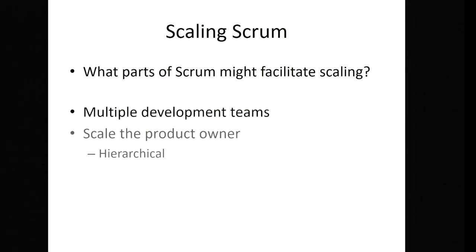We can also scale a product owner, and I'm going to go through some of these scenarios, and that might be hierarchical. So for example, if we're thinking about something like Microsoft Office, you might have a product owner for the whole of Office, and there might be a product owner for Word and Excel and PowerPoint and all the other bits and pieces that go into Microsoft Office might have their own product owners, but you might have a top level Office product owner as well.